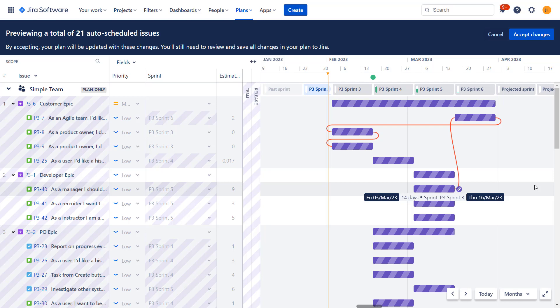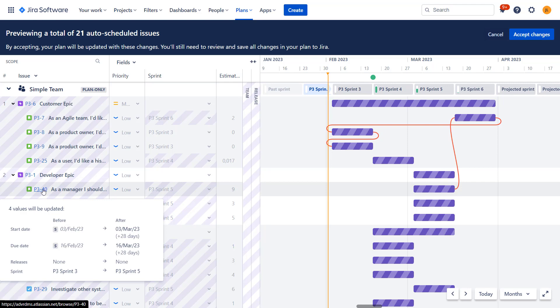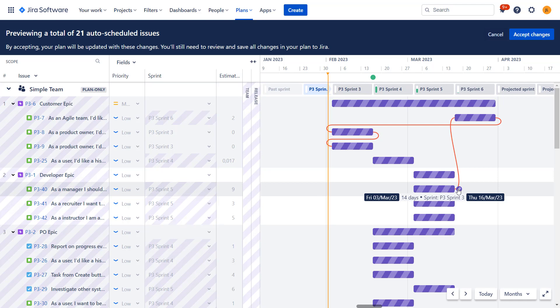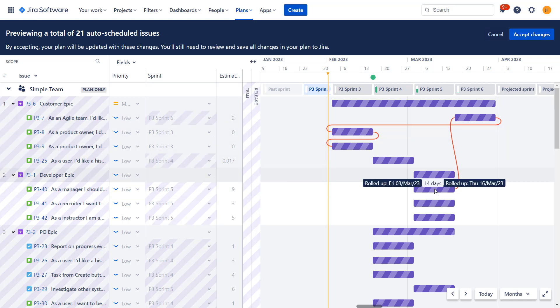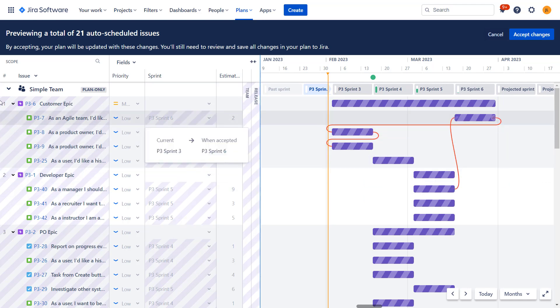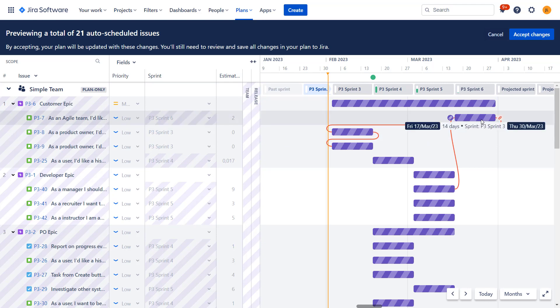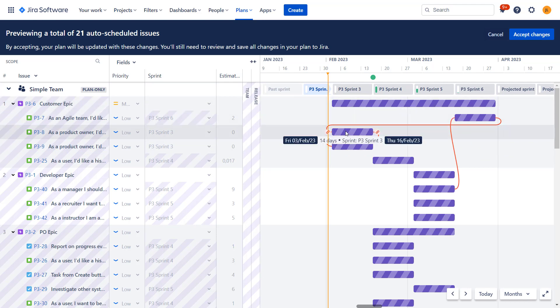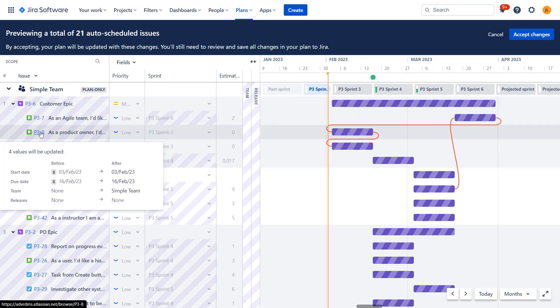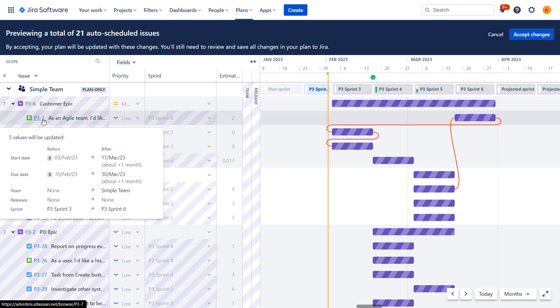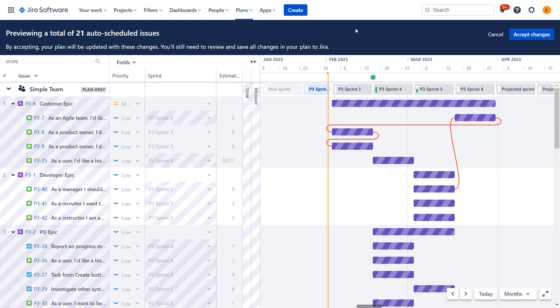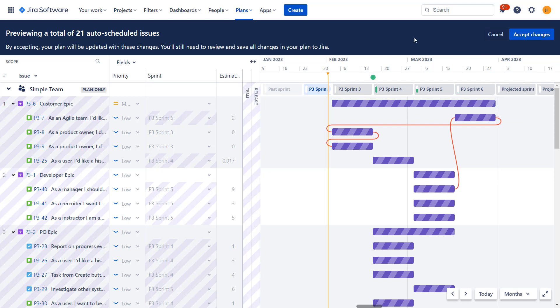Okay. So you can see that the first dependency. So this was our initial task. The one that was at the top, the dependency between this one and the next one, P3.7 was respected. It's good, right? But further dependencies are actually no longer respected. So how to schedule plans this task before the one that should be done earlier. So this is not perfect. This is something you need to look around for. There can be multiple causes of that. This can be sprint capacity. This can be fact that not all sprints are created on the boards, but these are scenarios that will happen on the daily basis for you. So you need to be careful with that. And you should check whether dependencies are respected or just after accepting changes, going through the plan one more time and updating this manually.